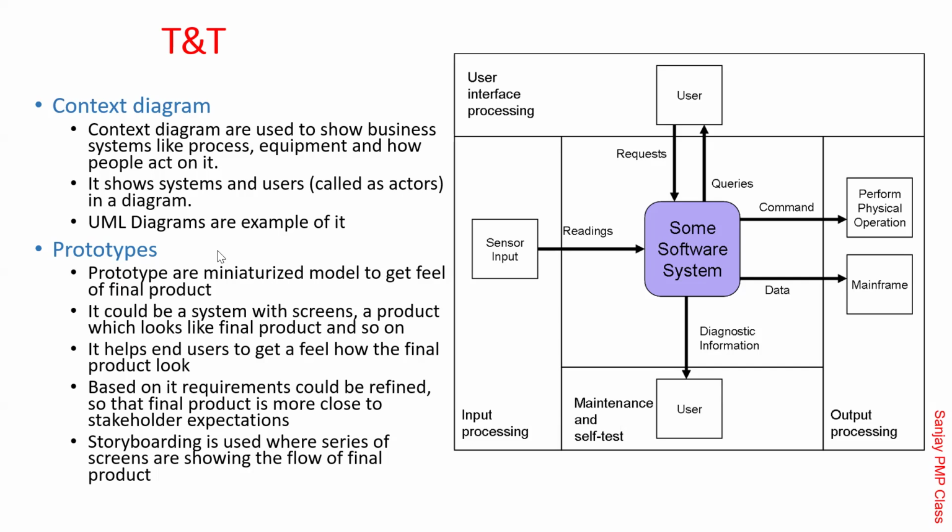All the requirements are done. See, one of the problems in requirement capture is that sometimes requirements are given by the customer, the business analyst takes them, goes back to the developers, and the developer says no, it's not possible. Then he goes back to the customer and says this is not possible, what do you want? Now if you are having a requirement workshop, all the people are there, so immediately if he is doubtful, he will say wait, let me call Kuldeep and ask him right there whether this can be built or not. So rather than things going back and forth, you sort it out together. That's the advantage of such a thing, Vishaka. Those workshops are meant for that. Correct?